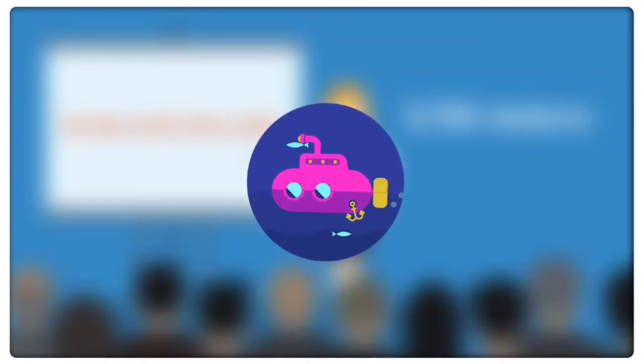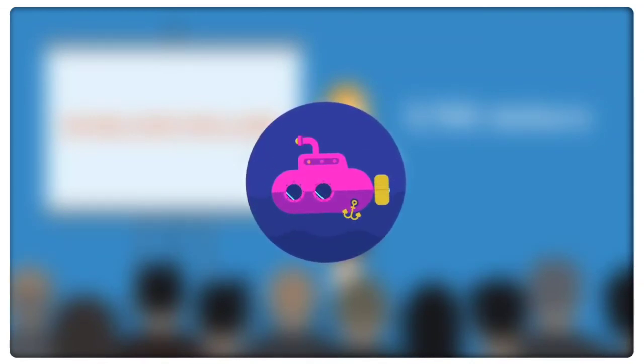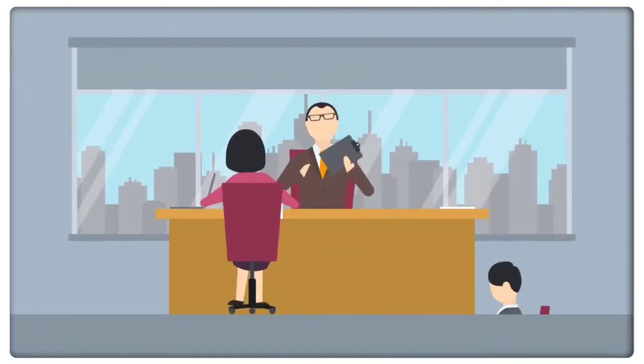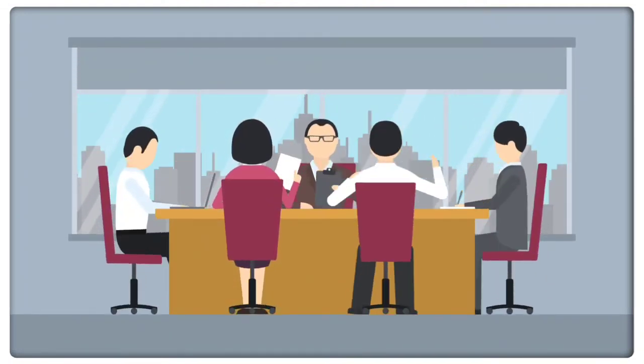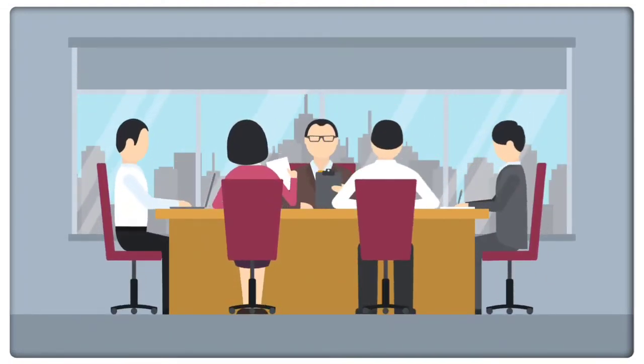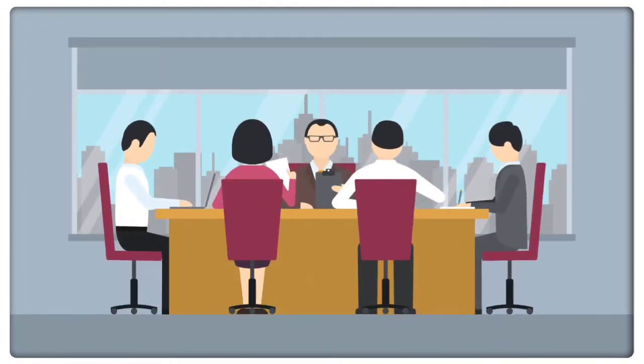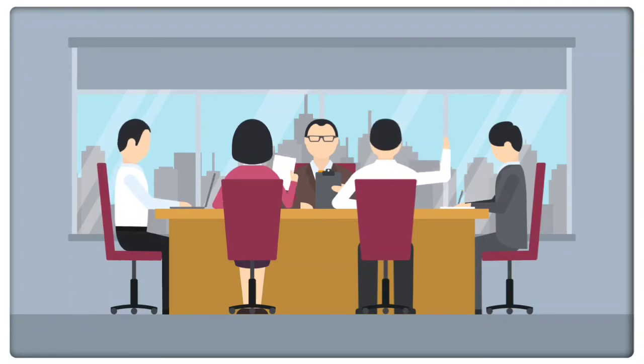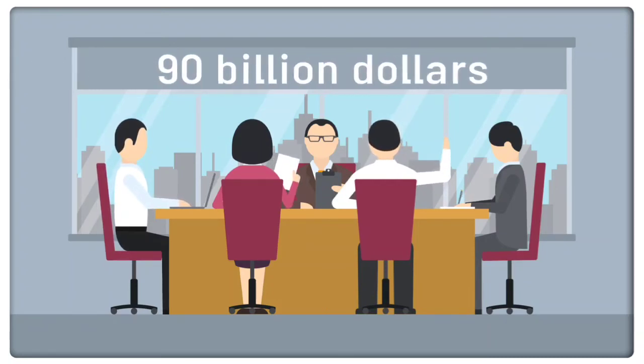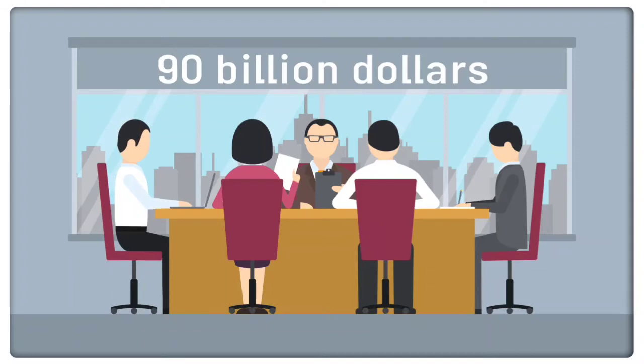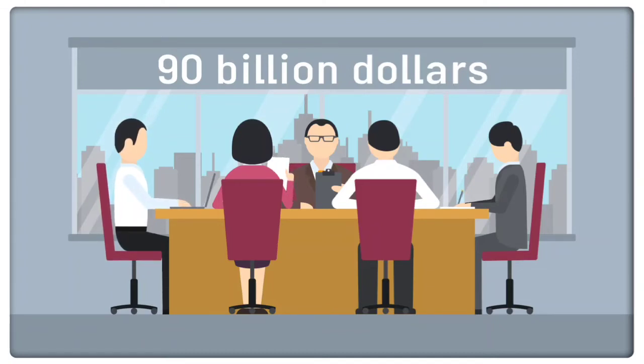This project has already experienced considerable delay in its design stage and the new estimates indicate the cost of this project will be around $90 billion instead of the estimated $50 billion at the time of the contract.